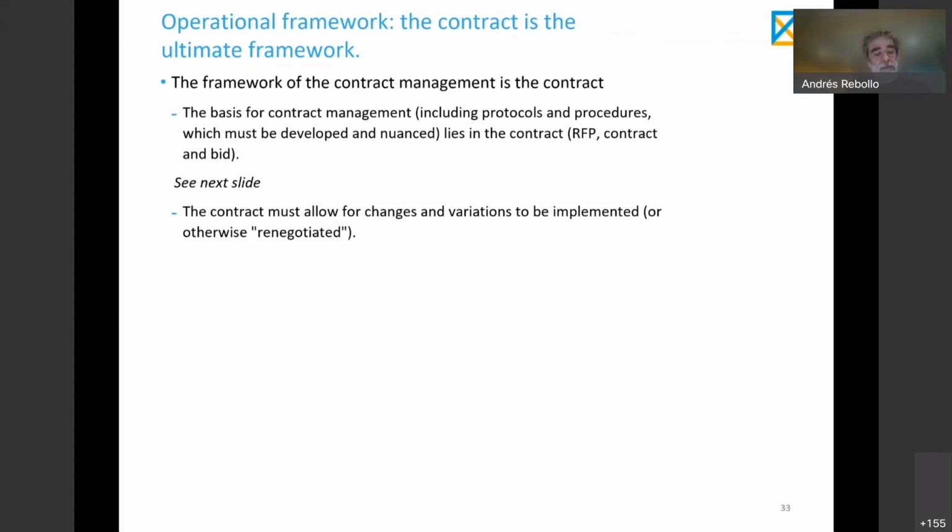There was, in Spain, for example, no? COVID was not contemplated as a force majeure event. In Spain, force majeure is a clause that responds to the Anglo-Saxon approach of a clause definition. It can only be a number of events, and if the event is not within that list, it cannot be dealt with as force majeure. So COVID affecting revenues would not be contemplated as a compensation event in Spain. However, everybody would agree that the spirit of a force majeure clause should include COVID.